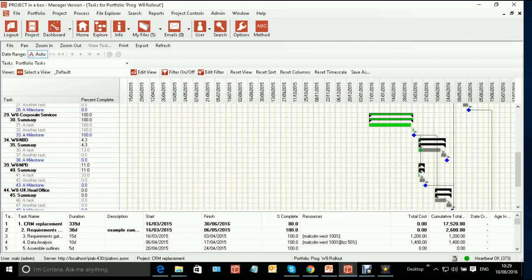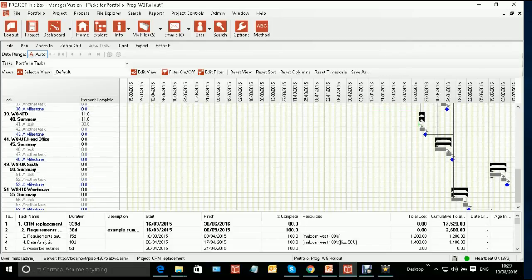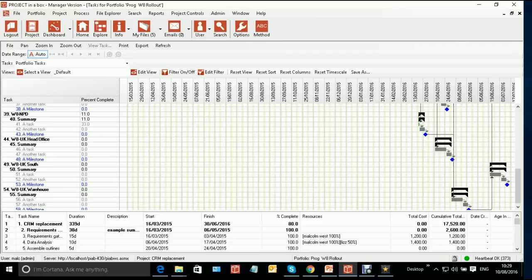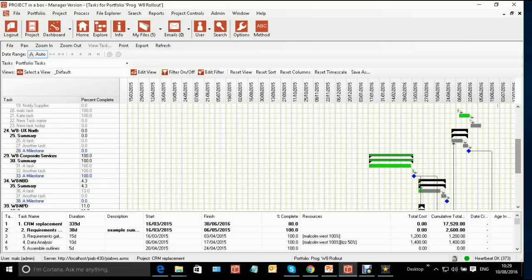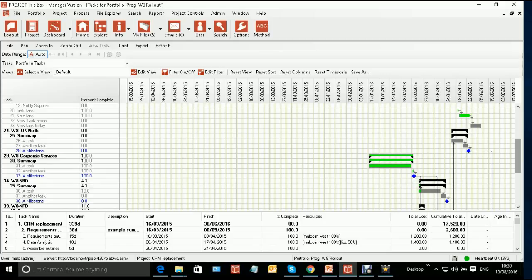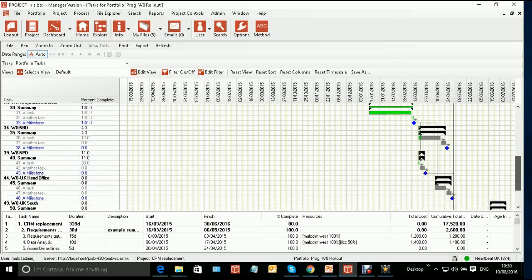Tasks in this project start after the completion of the milestone from the prior project. And we can have a number of those different relationships. So some of these projects down the end can only start when several other projects are complete already. And there might be some lags and things in there. So these dependencies obviously flow across multiple projects. They're not project to project. They're between a task in one project and a task in the second project.